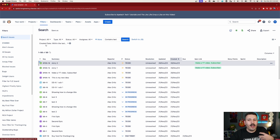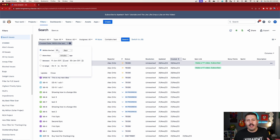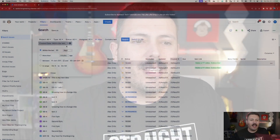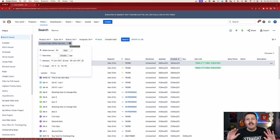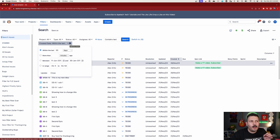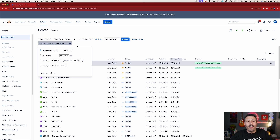It's already giving you a tease of what we're going to be discussing today. If you click into it, you'll notice that Atlassian is leveraging the field created date, telling us: within the last 30 days, what issues were created. Atlassian is doing this from an efficiency perspective, but the very first thing I tell you is click on that X, because it's only going to bring you issues from the last 30 days. It will give you a false sense of the issues — hiding all the history and only giving you a subset of your data.